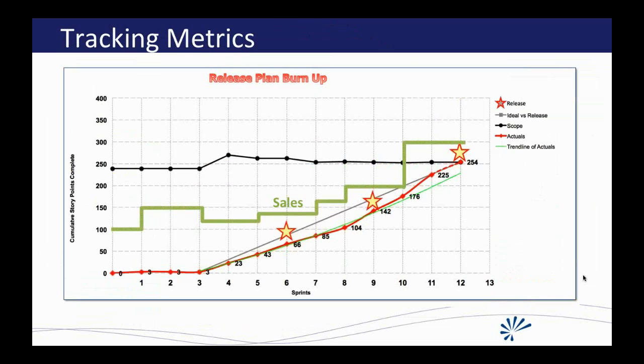which also leads me to the next piece, which is, do you guys know how much your sprints cost? What is our cost? This is not a hard number to come up with. Even if it's just based on your people, there's probably other costs too, but even if you could do it based on your people, what is your cost per sprint? This is an essential thing for your business to know, for product management to know.